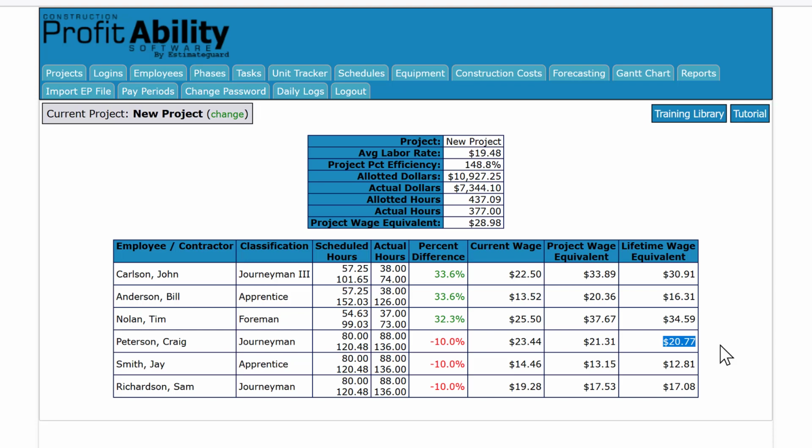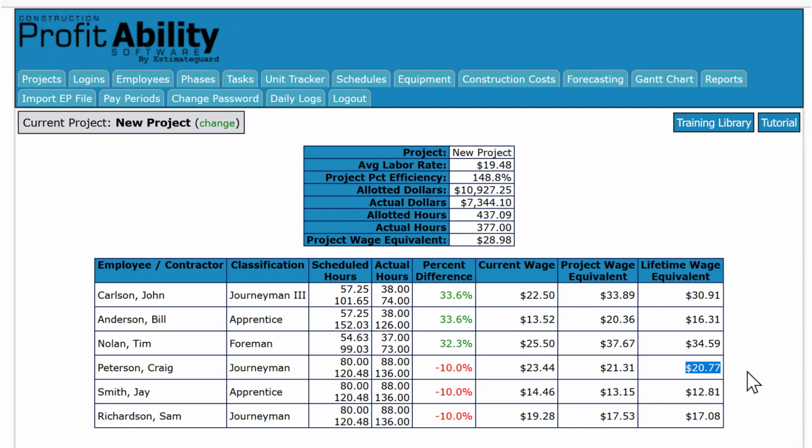who isn't. Like I say, normally, if you're telling them what they need to do and how much time they have to do it in order to make your company money, most of them are going to do that. So it's either a training problem or it's something they encountered on the project. And if it's something they encountered on the project, we need to take a look at, is there a change order available to offset this? And we also need to document that so that we know on future projects what we might be up against, right?